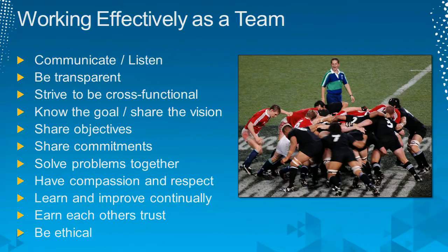Well, then the team would brainstorm what tasks we have to do to get that done. Someone's got to sign up for a Twitter account. Someone needs to build that control. Someone needs to research the SDK and learn how to do API calls. Someone needs to build a filter because the boss doesn't want profanity on that homepage. There's a whole bunch of tasks in there.